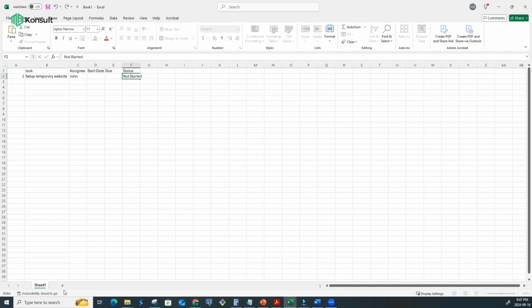So I would go and do a list of values on another worksheet, but you will be able to see not started, in progress, and then completed. That's what I usually use, three statuses, so that you can pick, right? And then you have comments, something like that. And then you start saying all the tasks that need to be done. You line them up. Who is doing what? Right? Testing.